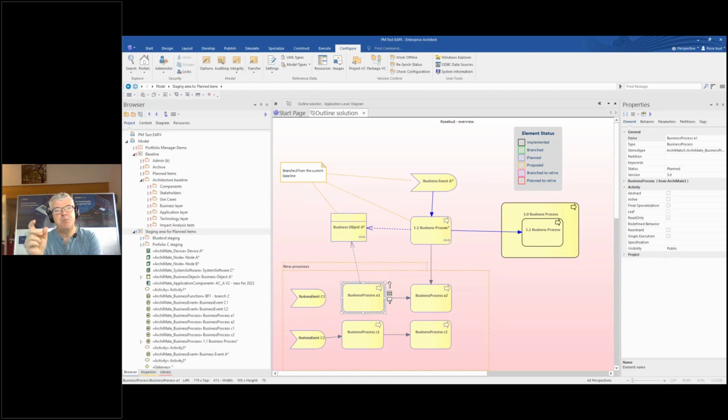So I need to have a change process that says, hey, look, I know I said this is what the process was going to look like, but I've changed my mind after that committed milestone. So I need to think pretty carefully about that. I need to take a branch. I need to make a change. I need to explore the impact, make my change, put it back. So it's not just, oh, it's all my stuff, I can go and do whatever I like. So we're employing a bit of discipline here. And if you're going to work in this solution architecture world, in this multi-project world, you do need a bit of discipline, a bit of, right, I'll do it this way, but not that way, and think about everybody else and be a good citizen as you're doing stuff.